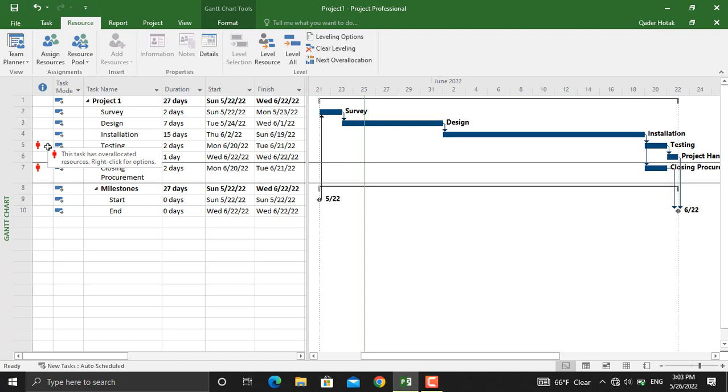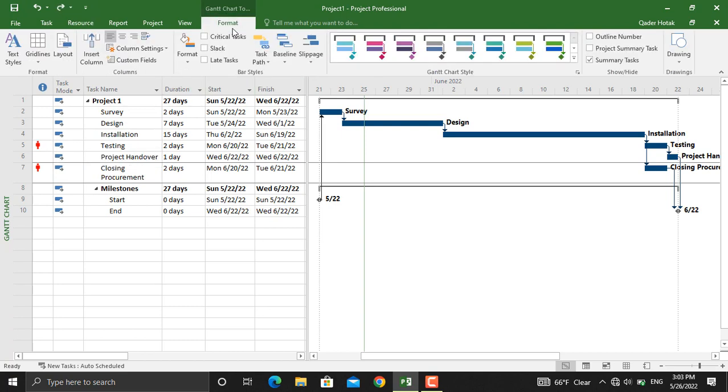For that purpose we apply resource leveling. As you might know, the definition for resource leveling is it changes our critical path. Let's see the critical path for this project. You will go to format, click critical tasks. The critical path will be shown in red here.